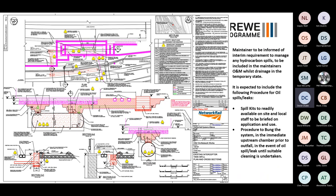We're going to fill it with foam concrete. That's going to be a fun job, trying to get the concrete hose over all of the Salop's Goods Junction South and basically fill it with concrete. And the advantage at that point is it will be stronger than the soil that was going to be there in the first place for the REB. The REB should now not fall through a hole into the ground when we discover the interceptor in about 20 years. Hey, this is why you do ground investigation.